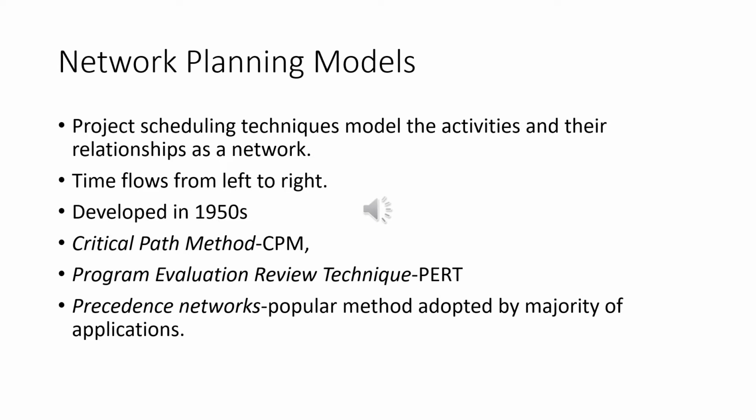More recently, a variation of these techniques called precedence network has become popular, and it is this method that is adopted in the majority of computer applications currently available. These three methods are very similar, and it must be admitted that many people use the same name, particularly critical path method CPM, indiscriminately to refer to any or all of the methods.